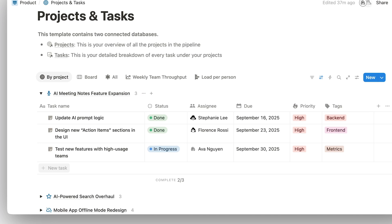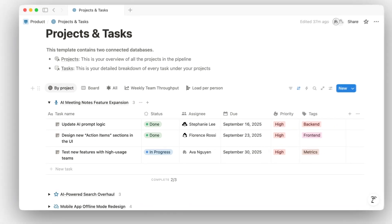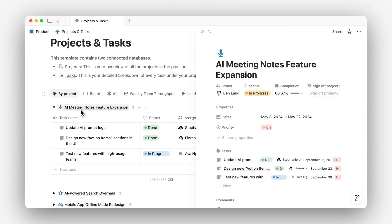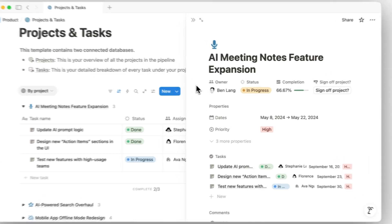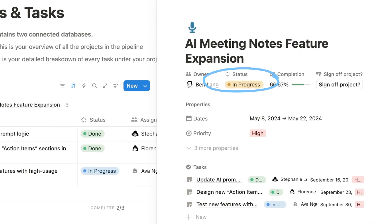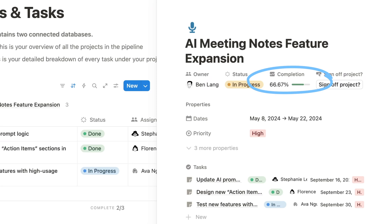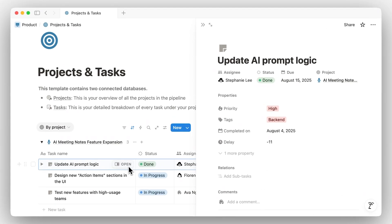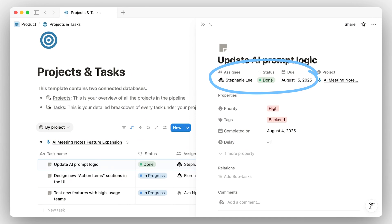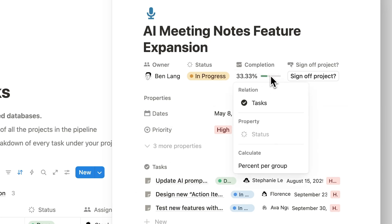Think of tasks as the action items that help move the project forward. Projects include key properties like status, related tasks, and even a built-in completion tracker. Tasks have their own properties too, like assignee, due date, and status. A project's progress is based on its tasks — the template calculates how far along a project is based on how many of its tasks are complete.